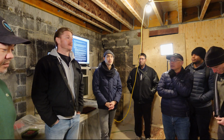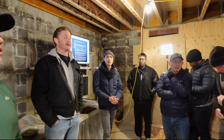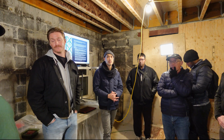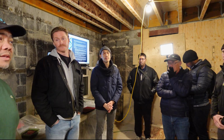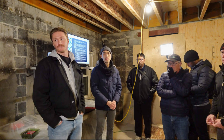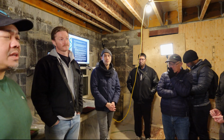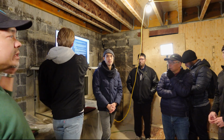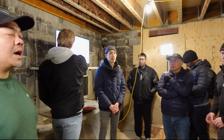Yeah, no, not required by the zoning bylaw. So the current requirement is N-1. That still exists, right? So if you have 4 units, you're technically supposed to provide 3 parking spots. But these days, it's a relatively easy variance to get at committee for parking, especially if you're anywhere remotely close to transit. The city tends to forgive you. And if you're building a garden suite, that may negate your need for parking at all.